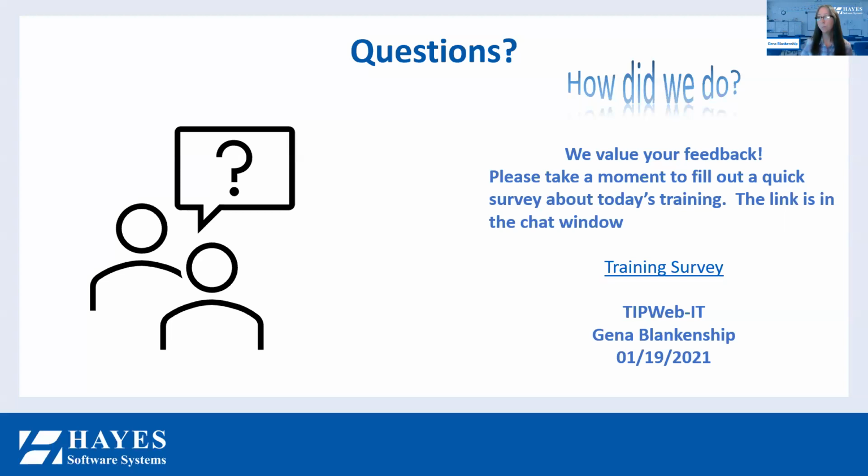So Cassie is asking, when performing a room audit that is not part of the initiated site audit, can you include staff issued inventory? The way I understand that question, I'm going to say no. Room audits that are done independent of a site audit cannot include staff issued items. But when we do a site audit, we can include both rooms and staff.